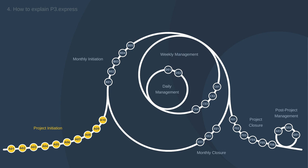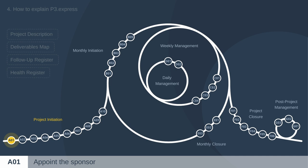The first thing done in project initiation is to appoint a sponsor — one executive in the company who can provide resources, make high-level decisions, and be the project manager's contact point with higher management. This is exactly like the executive in Prince2 or the sponsor in the PMBOK Guide. The concept of a sponsor is fundamental across most systems, yet many people still have trouble with it, perhaps because it's been the norm to expect the project manager to be accountable for everything.